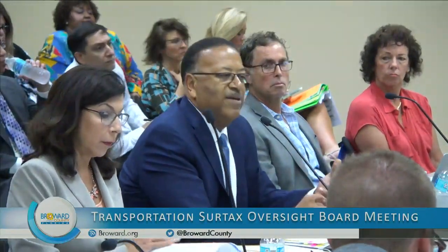They require what's called an alternative analysis, which actually takes a look at what type of system should be built. Should you build any system at all? Can buses satisfy the need, or should there be some other form of transportation? It also requires that you do what's called the LPA, or the locally preferred alternative, which determines which is the best routing.